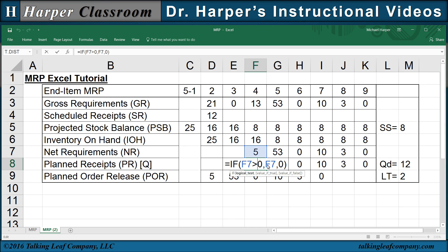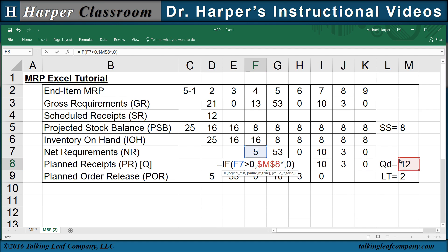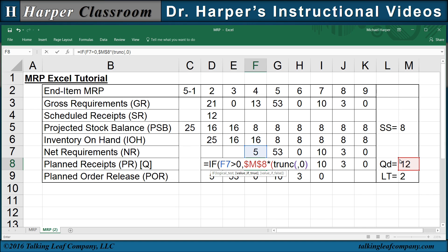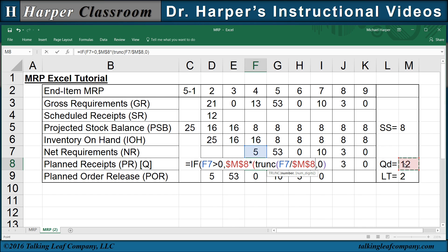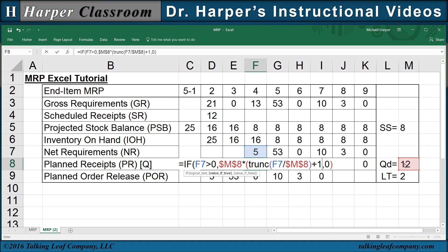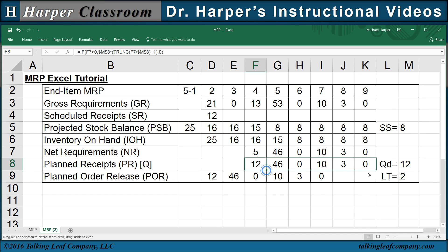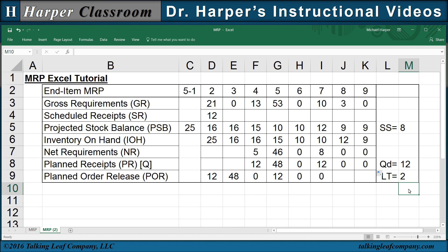When the net requirements are greater than zero, then we have a positive lot size. But the lot size is determined by how many times our net requirements can be divided into our fixed lot size. We take our lot size with F4 to freeze and we multiply that by: we truncate F7 (our net requirements) divided by our lot size F4 to freeze, and then we add one to that. This is how many times it divides into it plus one — times how many times we have to order a fixed lot size. Otherwise, we want zero. And then we copy that over. That's how you determine an MRP for a fixed lot size discipline.